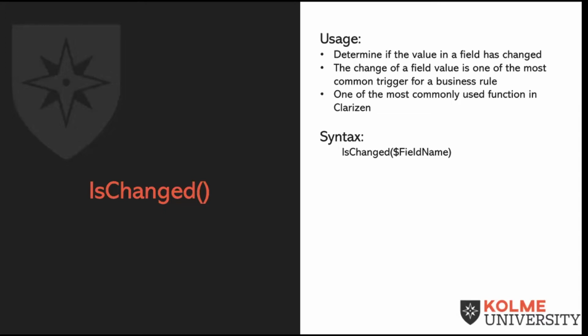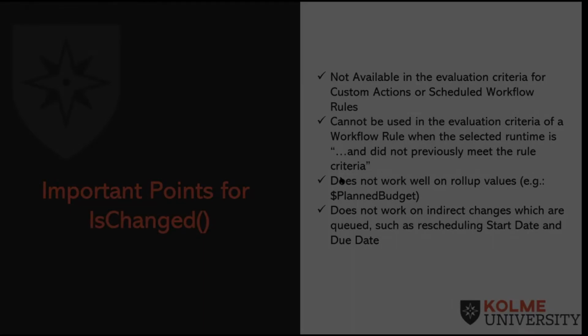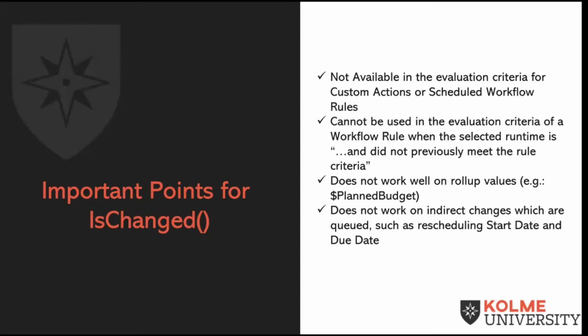Definitely. All right. So can you talk us a little bit through the syntax? Well, the syntax is actually quite easy. It's simply the field value that would be changing between the parentheses. So for example, you would say IsChanged, open parentheses, $state, close parentheses, and it detects when a state or status has been changed. That's pretty easy. Yes, it is.